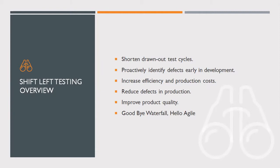Goodbye waterfall, hello agile. In traditional testing, a typical waterfall software development project would have testing occur immediately prior to release into production. When bugs or usability issues were found, the release would be delayed until they were fixed — testing became a bottleneck that seriously hindered the ability to deliver on time. Modern businesses applying the waterfall model have difficulty surviving; if they release a new version only twice a year, they lose customer relevance.